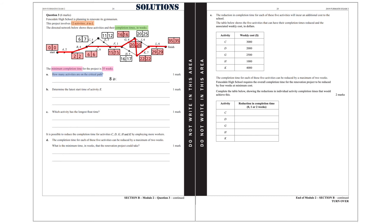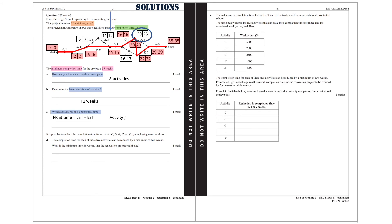That is 8 activities. Part B: determine the latest start time of activity E. We have already done that, so that is 12 weeks. Part C: which activity has the longest float time? Remember that the float time is the latest starting time minus the early starting time. By inspection we can see that activity J has the longest float time.